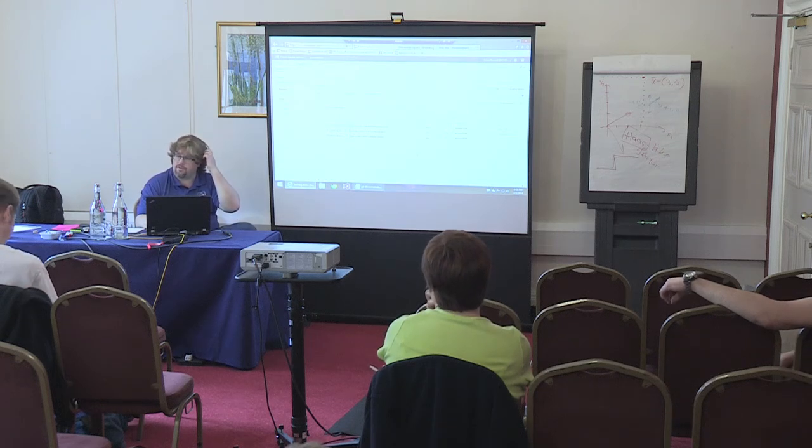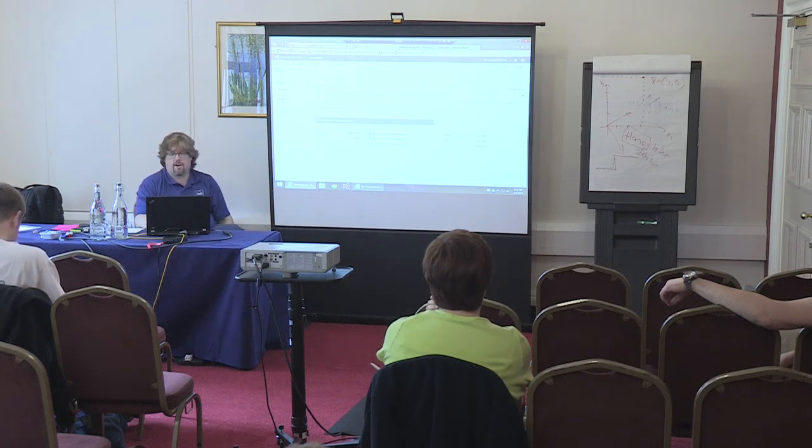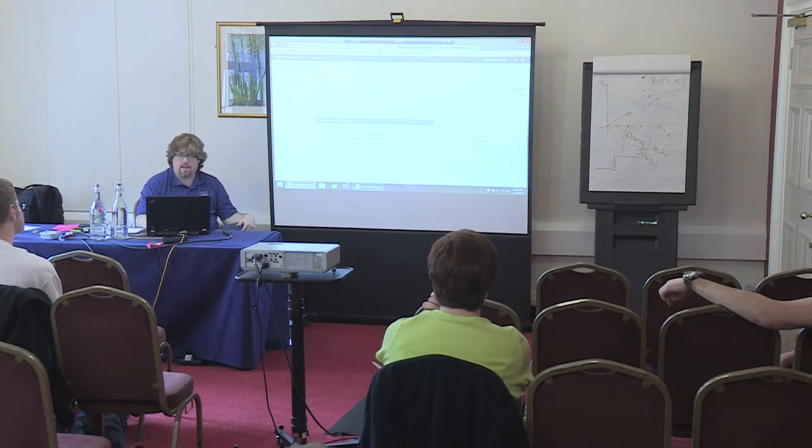One of the things you want to do is often forecast. If you're using the effort field, you can turn on forecasting, and based upon a velocity of 10 story points, they're going to say that, well, basically, you can get this done in sprint 1, and these are going to be done in sprint 2.